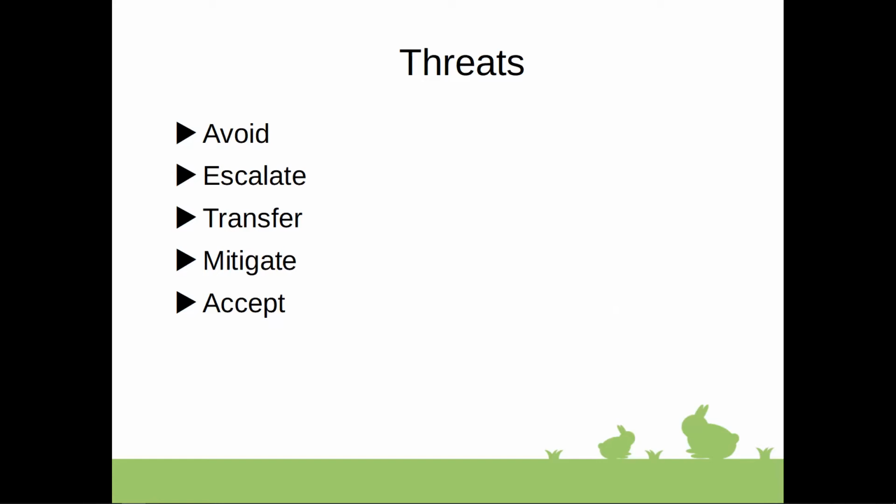Threat mitigation is a way to reduce the probability of occurrence and the impact of a threat, and early mitigation action is often much more effective than trying to repair the damage of the threat that has occurred. Unlike avoidance, it's an active step towards reducing threat impact.